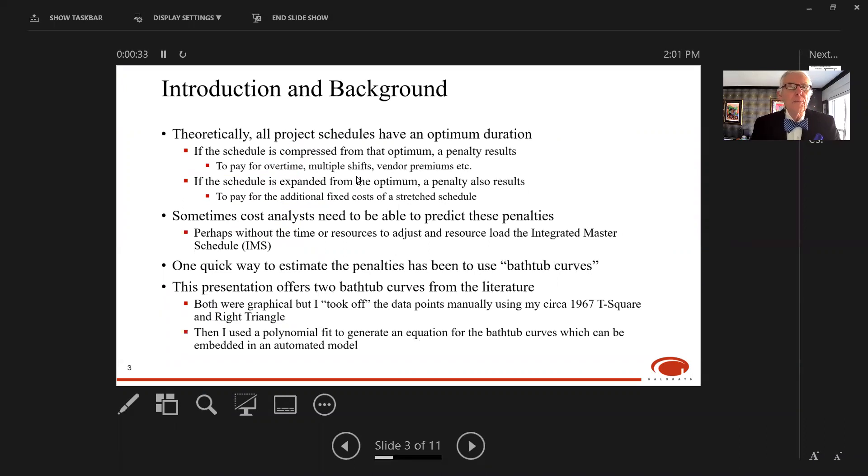First, a little introduction and background. Theoretically, all project schedules have some optimum duration. If the schedule is compressed from that optimum, there should be a penalty to pay for overtime, multiple shifts, and vendors' premiums for delivering hardware and software early. If the schedule is expanded from the optimum, there should also be a penalty to pay for the additional fixed cost of a stretched schedule.